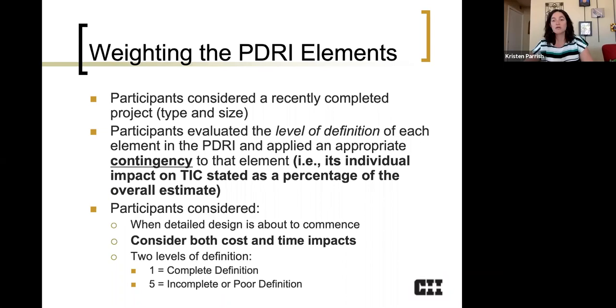So when a practitioner decided I'm going to contribute to this research effort, I'm going to help, what they had to do was they would take a project that they had recently completed and they would evaluate the level of definition for each element in the PDRI and apply contingency to that. So that contingency would be that element's individual impact on total installed cost and they would state that as a percentage of the overall estimate. They would do this at a point in time, go back in their mind to think about right before detailed design is going to begin.